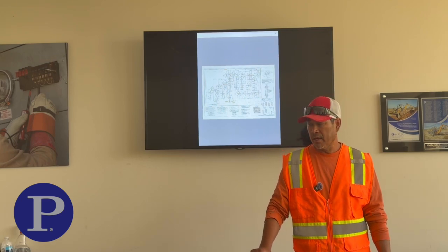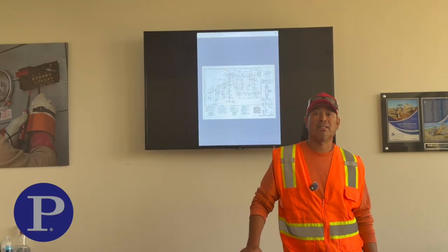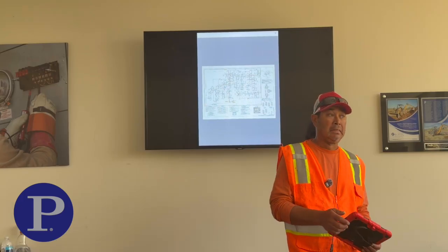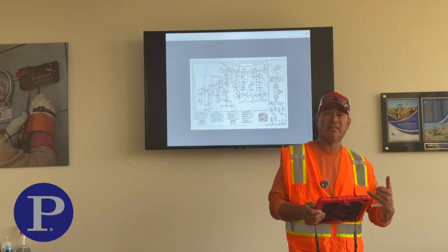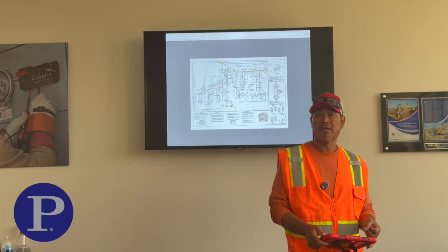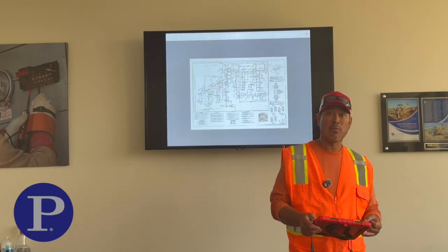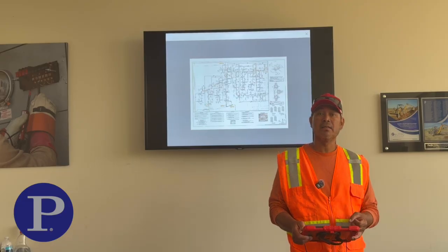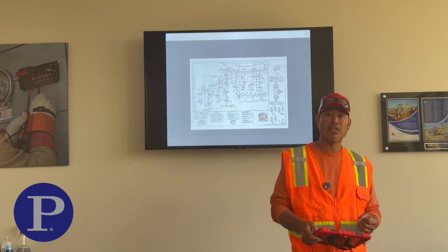If you see in the standard something different than what is in the scope of work, please let us know, because it may be the estimators didn't catch a little something in the standards. It may be a different type of pipe, maybe schedule 40, maybe schedule 80. Even the color of the pipe: for AT&T, many inspectors want type C pipe. It has to be white.